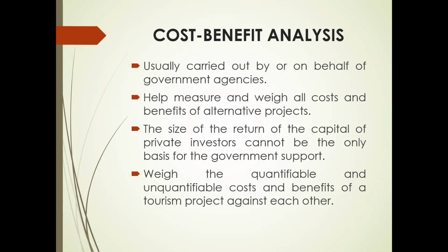Some of the factors related to the criteria that have been mentioned can be measured quantitatively, others cannot. For example, the economic contributions of a project can be forecasted numerically, but the social or cultural impacts cannot. Thus, a cost-benefit analysis should weigh the quantifiable and unquantifiable costs and benefits of a tourism project against each other. If the result of the cost-benefit analysis is positive, some project developers may apply for government financial incentives, while others may go ahead without government assistance.